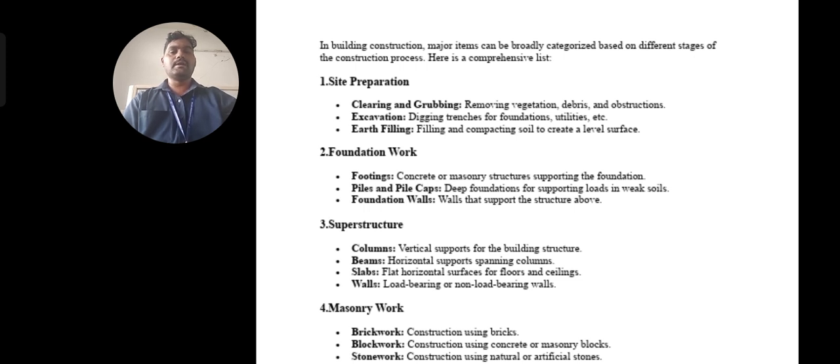You want to finish the building very effectively and quickly. So the first one is site preparation. If you take any land and you want to start anything, but there are a lot of garbage and vegetation existing, we want to remove all those things and clean. That comes under site preparation. Even if it has trenches, you want to fill the trenches with soil, and if needed, you can go for an excavation also.